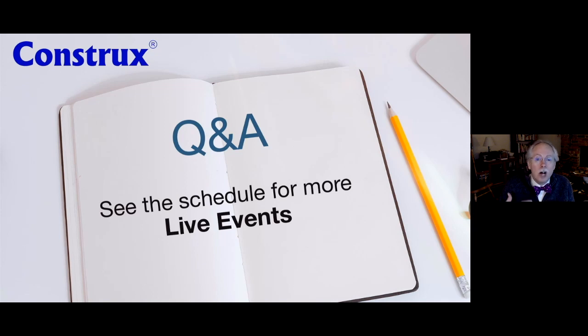So my first goal is always to say, hey, let's make that promise an unreasonable number, one that anyone looking at it would say, it can't take that long. And if you're at 90-95% confidence, yeah, it shouldn't take that long. Only once in 100 does it ever get past there. Or 10 in 100 if it's 90, or 5 in 100 for 95. But it means 90 are finishing earlier. It would be really weird for one of those to go past.